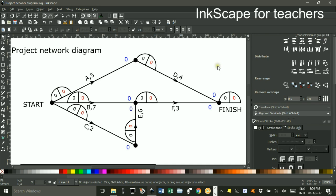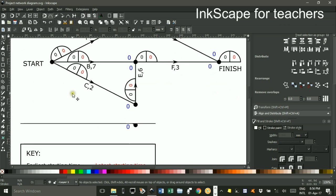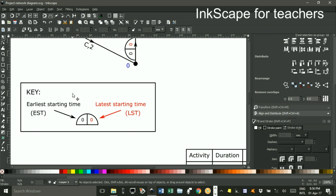Welcome to Inkscape for Teachers. I'm Geoff Phillips. In this tutorial, I'm going to look at using a network diagram that I've drawn in Inkscape to find the critical path. So away we'll go. First of all, the first black number in each semicircle is the earliest starting time. The red is the latest starting time, according to this key here.